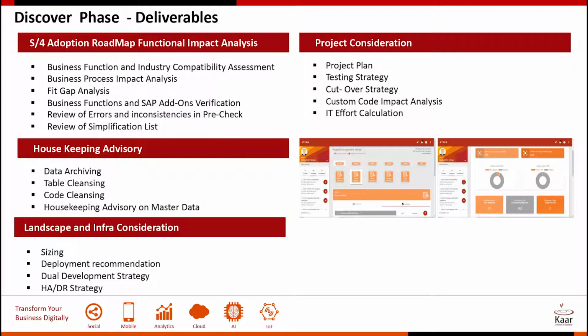So the deliverables from a discover phase: the business function and industry compatibility assessment, the business process impact analysis, the fit gap analysis, the business function and SAP add-on verification, and the simplification list. And we also provide a lot of housekeeping advisory, primarily around data archiving, table cleansing, code cleansing, and so on. Why this is important is because your downtime is determined by the size of your database, and all the landscape and infra considerations, and also the project considerations.